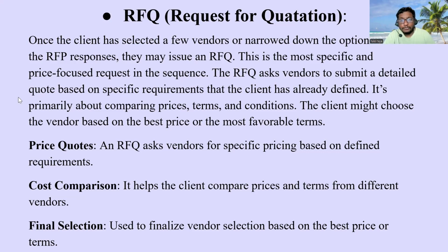Once the client has selected a few vendors and narrowed down the options from the RFP responses, they may issue an RFQ. RFQ is nothing but request for a quotation. This is the most specific and price focused request in the sequence. As I said, they'll be focusing more on budget: in how much budget, in how much timeline, you can give me the solution. The RFQ asks vendors to submit a detailed quote based on specific requirements that a client has already defined.